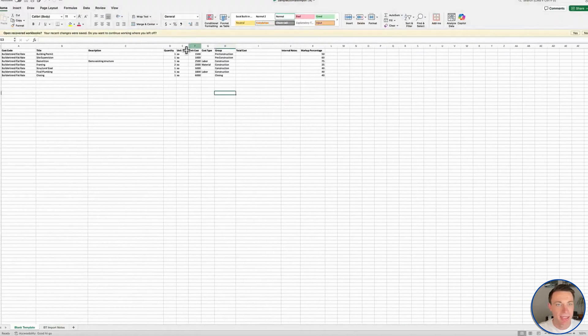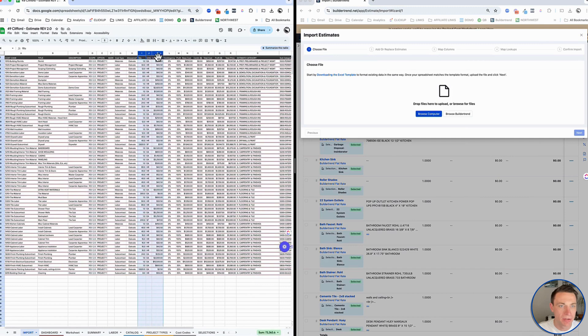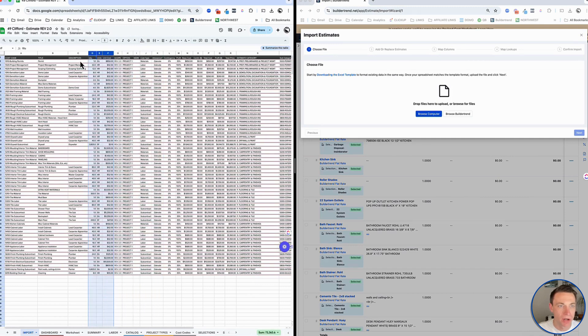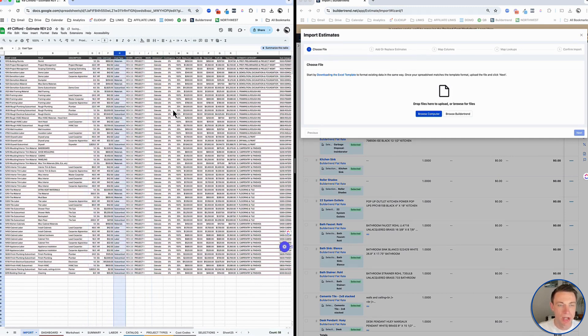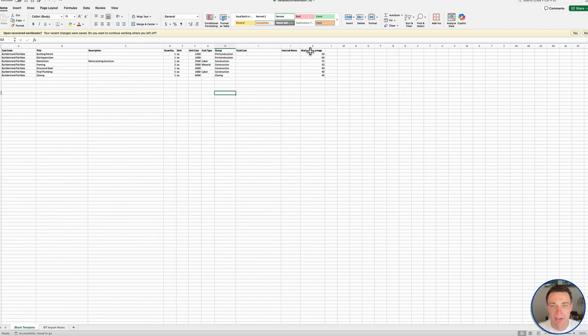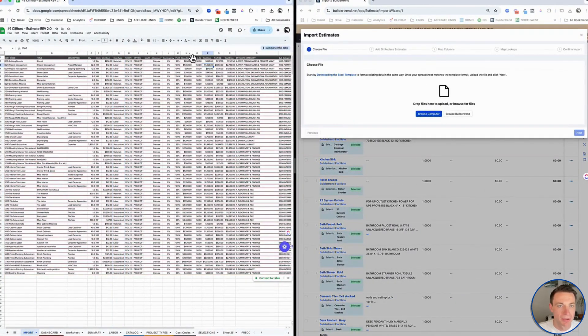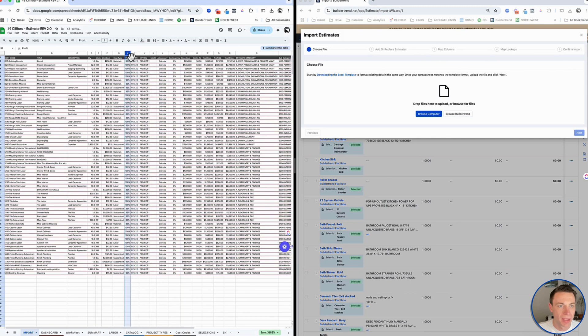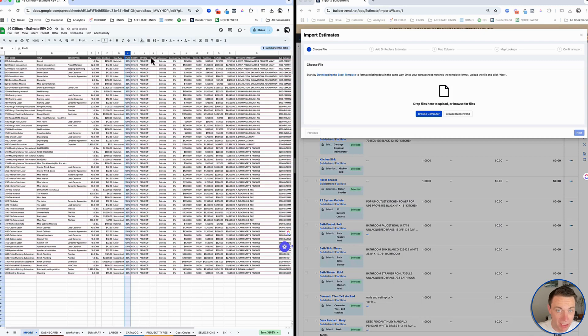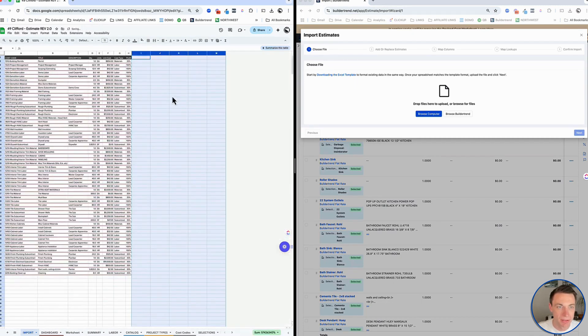Beyond that it is quantity, unit, unit cost, cost type. I'm bringing these over to organize them. I'm not going to use group yet. I'm going to use markup percentage for sure. That's my percentage right here, this profit. I'm going to bring that over. That's really all I need. I don't need anything else. BuilderTrend is going to be doing the calculation for me. I'm just going to get rid of all the rest of these columns so I don't confuse anything.